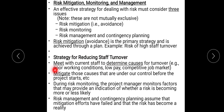The strategies for reducing staff turnover risk include: first, meeting with current staff to determine the causes that may cause turnover, such as poor working conditions; then mitigating those causes that are under control before the project starts. In the monitoring step, the project manager monitors that everything is going in proper flow. Risk management involves contingency planning — it comes into effect when all mitigation efforts have failed and the risk has become a reality.